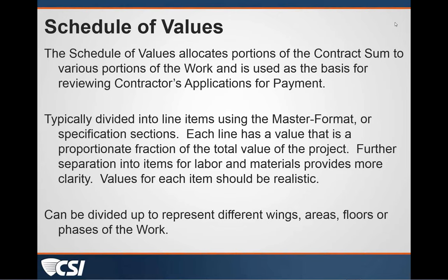I would strongly encourage you to do so, especially for items that may be delivered and stored on site but not yet installed, so that you can more accurately make your certifications for payment. If you've got a hospital and it's got hundreds of doors, and the contractor gets the shipment and he's got two trailers full of doors out there, and he doesn't have labor and materials broken down separately, it's going to be tough to look at a huge number and make that accurate determination that, okay, half of it's labor, half of it's material. So you need to get that broken out so you can be realistic in making your certifications. The values on these pay apps need to be realistic.